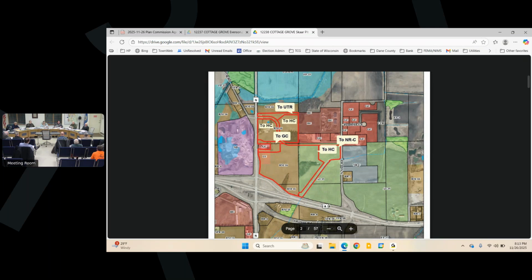Then going to an 80-foot road, 80-foot right of way. We thought Mark's comments at the last meeting got us to that point, based on the 12-foot lanes and the shoulders, and so we changed it from 70 to 80. That's what we had back on North Star, 70. I'm sorry if I confuse matters, but the cross section is in the subdivision ordinance and you're saying you couldn't build that in 70? We have no problem going back to the 70.